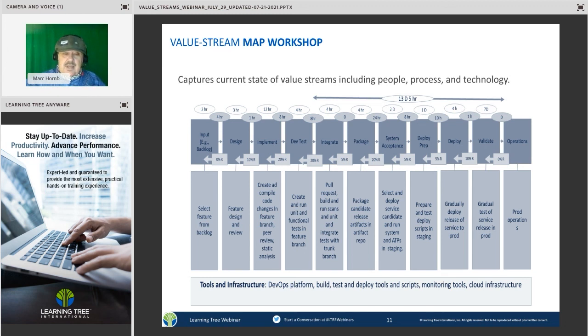Anyway, the idea is that you first of all decide on what is the set of steps, stages for your value stream. These are typically anywhere from like 6 to 15 stages. You try to map it out in series. Each stage is usually defined by a set of activities that have an output and an input, a defined output and an input. You then try to find out how long on average. Usually these are averages, the time to process each stage, and any wait times between stages.